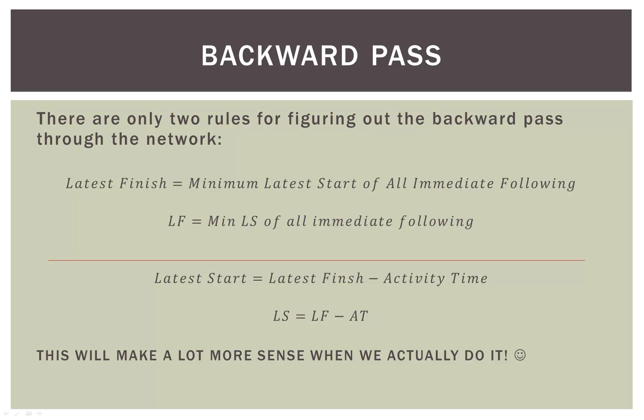In the backward pass, remember we're starting at the end of our project and running it back in time to the beginning. We're finding two pieces of information: the latest finish, which is LF, and the latest start, which is LS. To find the latest finish, we find the minimum LS of all activities that immediately follow the node we're on. The latest start is just the latest finish minus the activity time. The backward pass is the least intuitive of the two because we're actually going backward in time, and it will make a lot more sense when we actually do it in the second video.